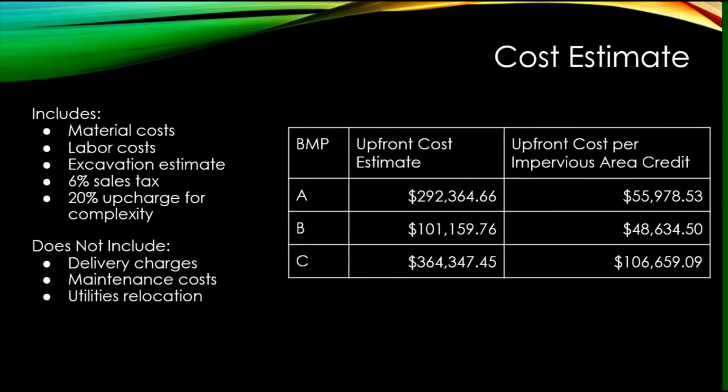A detailed cost estimate was created for our proposal. The budget cost estimate was broken into labor and material costs for each BMP. Within labor costs, equipment costs were added if relevant. Pricing data came from RS Means and various local company price estimates. When pricing values conflicted, the estimates from Maryland suppliers were used.